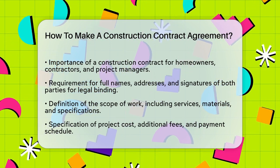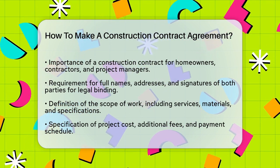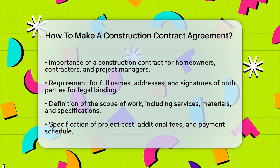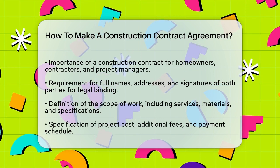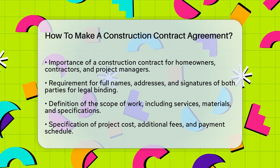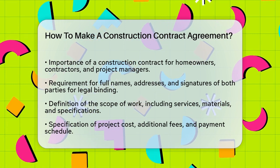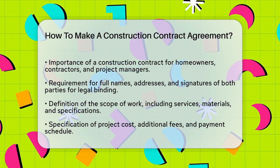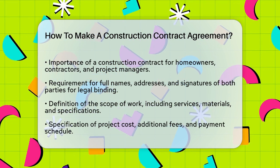Next, you need to clearly define the scope of work. This section should detail exactly what services will be provided, including descriptions of materials, quality, grade, and any other specifications relevant to the project. For example, if you're renovating a house, the scope of work should outline what rooms will be renovated and what materials will be used.